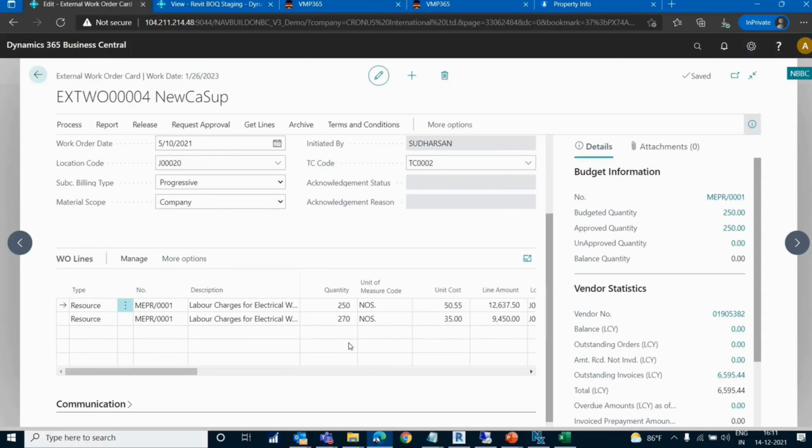And on the cost part, for the contracts team, the system will validate based on the budget validation mapped in the jobs. The system will validate the unit cost of each and every item or resource specified in the rate analysis, so the system is going to validate the cost level as well. Both quantity validations and cost validations will happen before the order is issued.